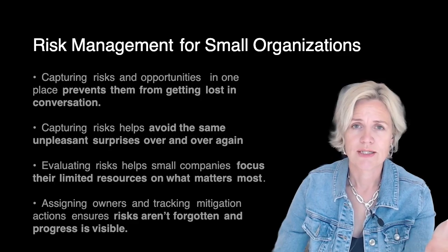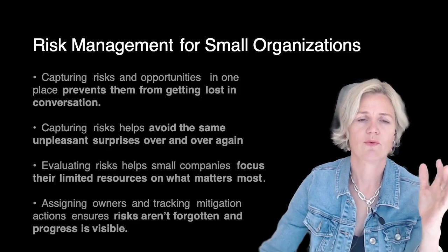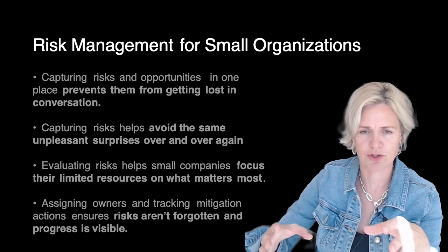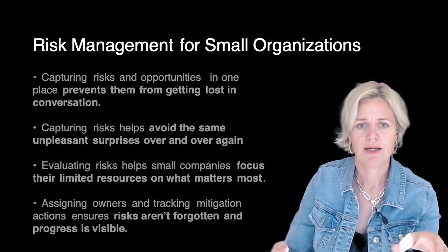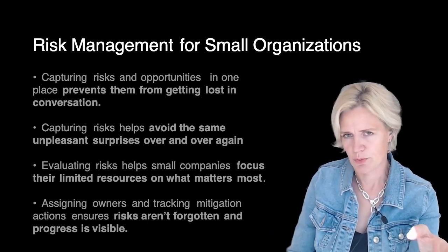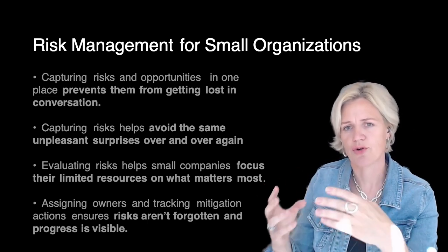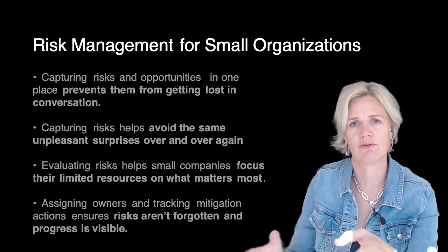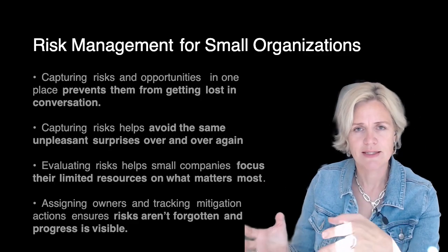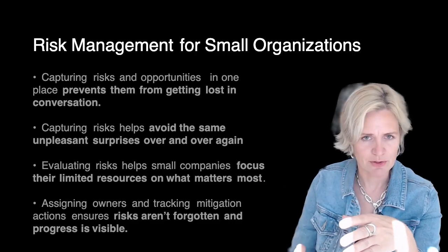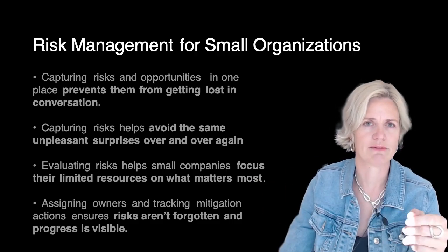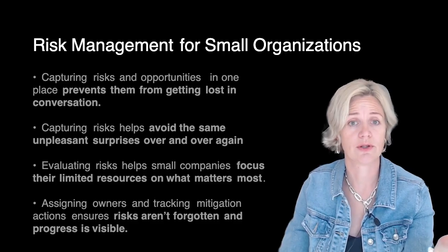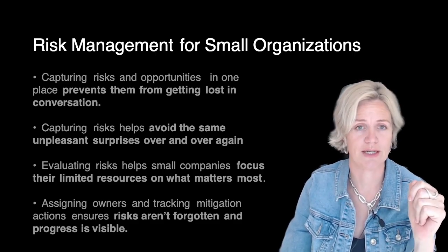But now what you need is a structured approach so that once your meeting ends, the ideas, the risks and opportunities that you have just talked about won't just vanish. It's common that no one takes ownership of this type of risks. No one actually tracks them. Nobody has put a timeline on them. And nobody, of course, has any follow-up actions. What that means is that you will keep on talking about those things in every meeting that you have. And when risks actually occur, they will surprise you, although you have talked about them a long time.